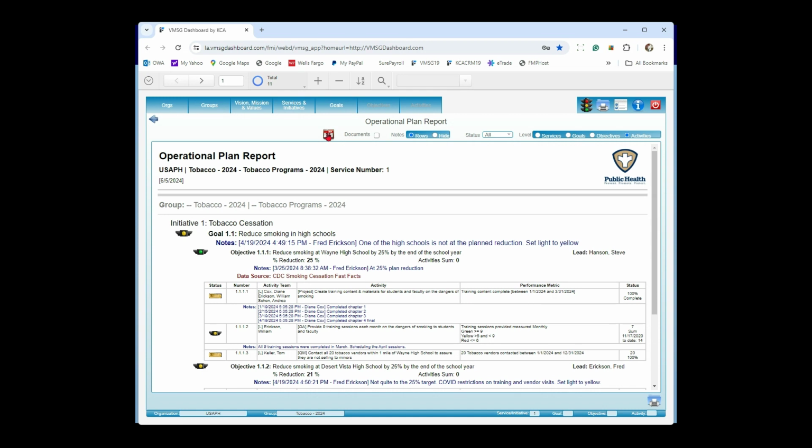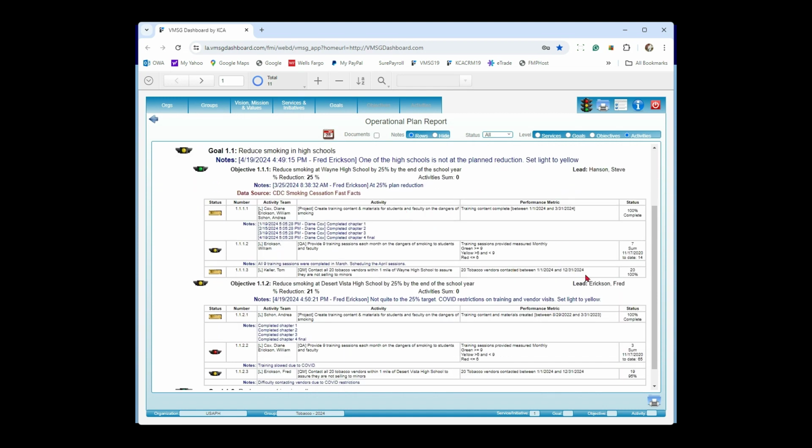The first one is a date range. So now down here in the activities, you'll see that we have an ending date for every activity. Now the QA, the quality assurance activities, it's a calculated ending date based on the beginning date and the frequency. So if it's May 1 of 24 is the beginning date and the frequency is 1 month, then the end of May is going to be the calculated ending date. So it's still in there. You just don't necessarily see it in here.